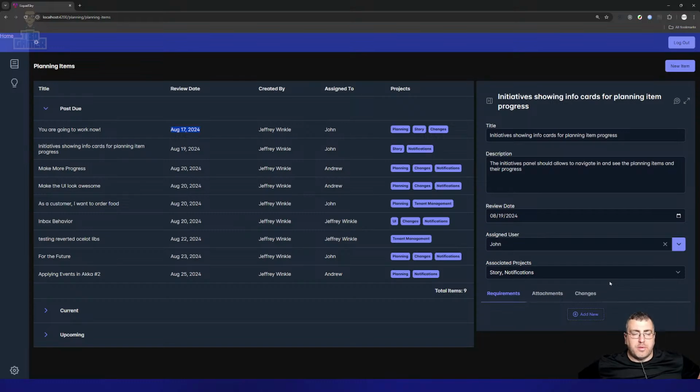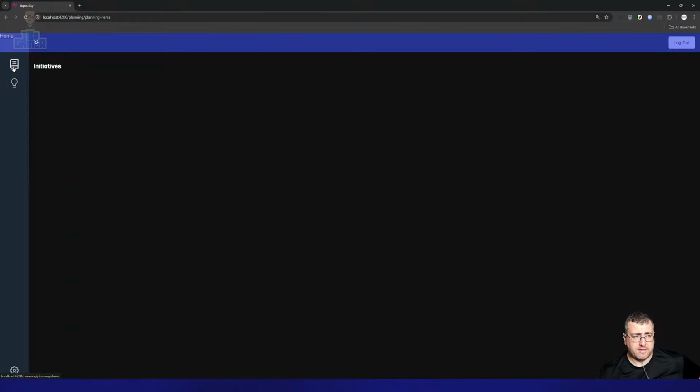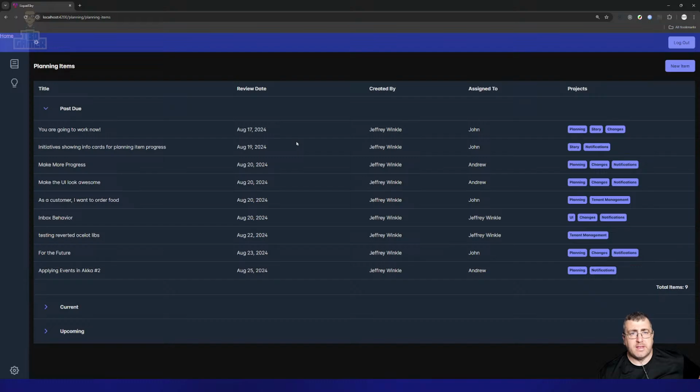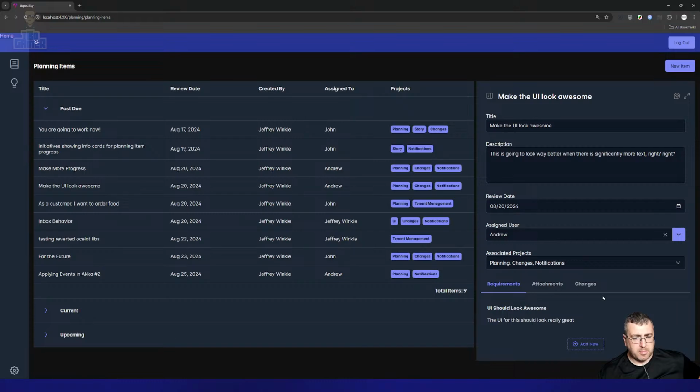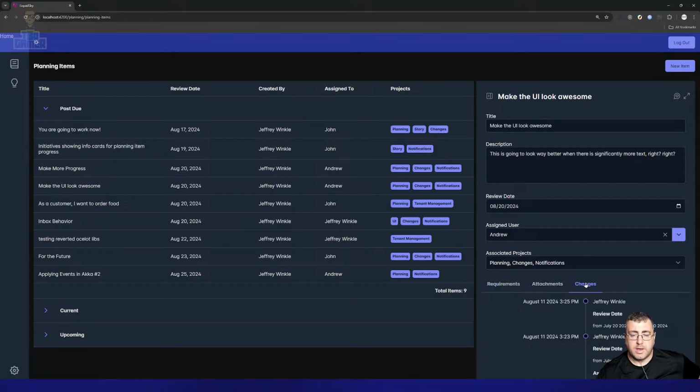And again, the idea is, from a glance, don't forget dashboards, etc., have to exist for this. But from a glance, here's the work that we currently have outstanding. Here's where it lies. There's estimates on 95% of the stories, and we estimate current burn down to be done in 3 months.